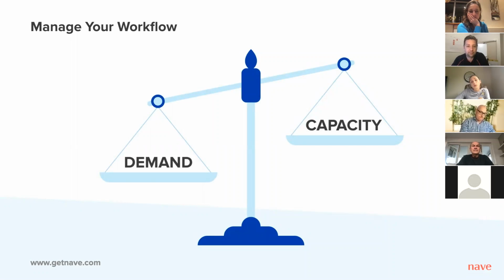An efficient workflow requires consistent management of work that goes through your process to keep tasks entering the stream in a smooth manner. Balancing demand with capacity is the key here. Managing flow also means removing obstacles and eliminating bottlenecks. The practice of applying WIP limits will introduce some idle time to your team members. So if your team is not able to start new work as the WIP limit has been reached, they will have to collaborate with each other and swarm outstanding tasks to complete them faster. The focus is moved to the impediments in the system and their prompt resolution.